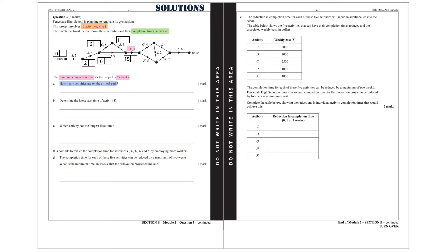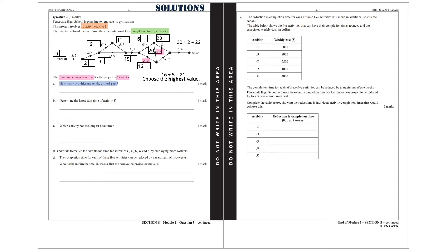The early starting time for activities G and H are 16, because it's 15 plus 1, which is 16. The early starting time for activity J is 16 plus 4, which is 20, and the same for activity I. When we get to activity K, we have to do 20 plus 2 equals 22, coming from activity I, and 16 plus 5 equals 21, coming from activity H. Again we choose the highest value — going from left to right we always choose the highest value — and that is 22.